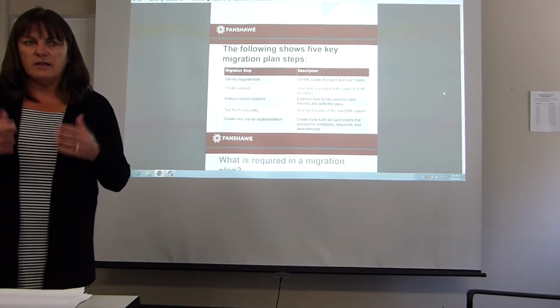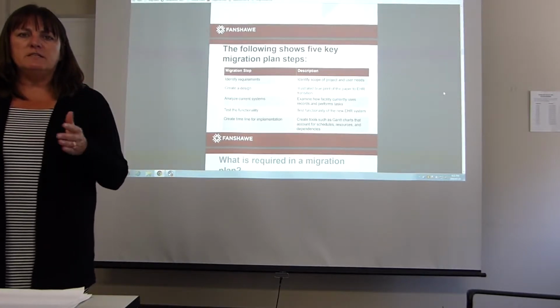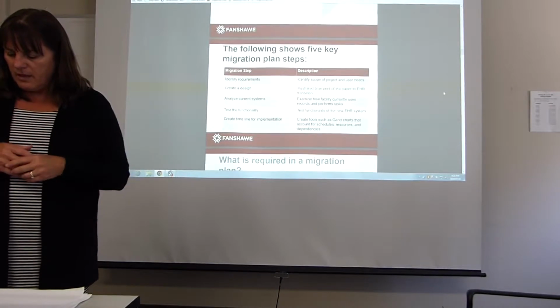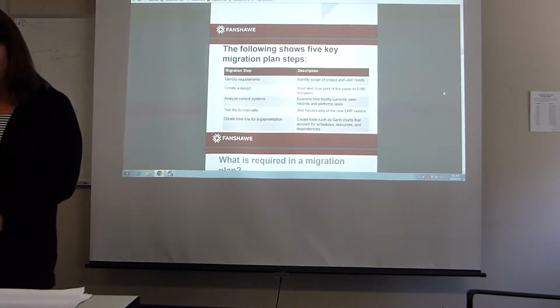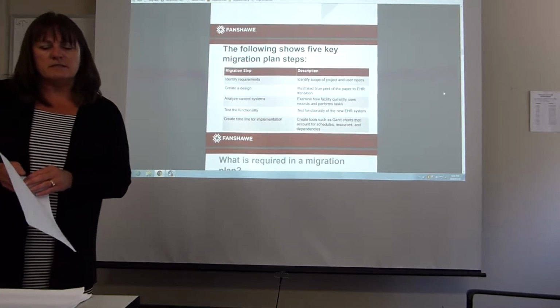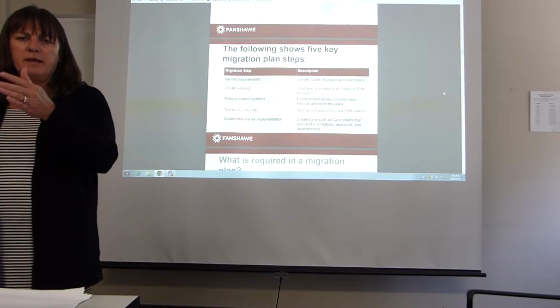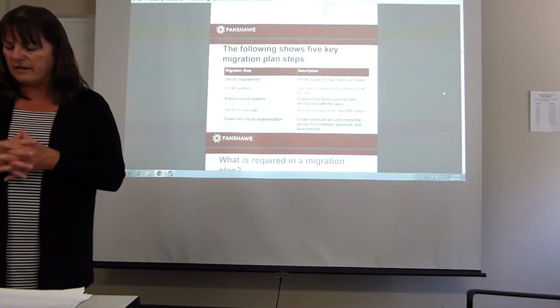A Gantt chart will identify what steps will be done by when and how the steps are connected to each other. These steps are listed with due dates and persons responsible for those steps, and also what is a dependency. So if I need to get this task completed but I'm dependent on the other task getting done first, they would be linked together on the Gantt chart.